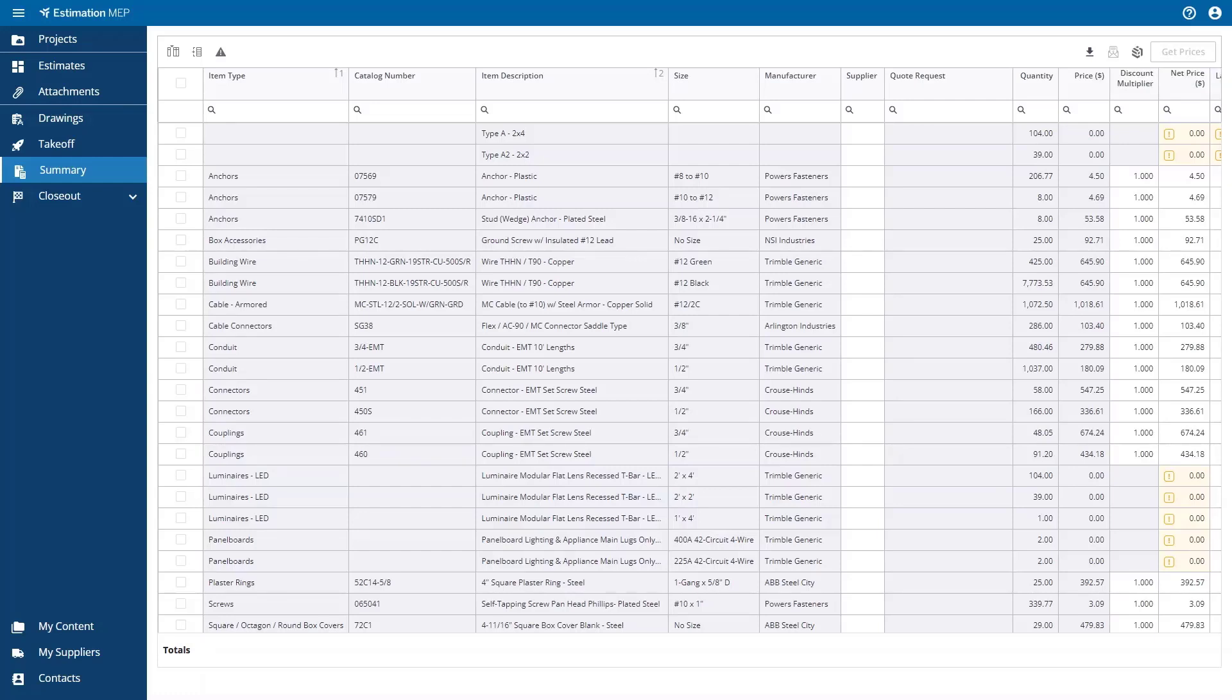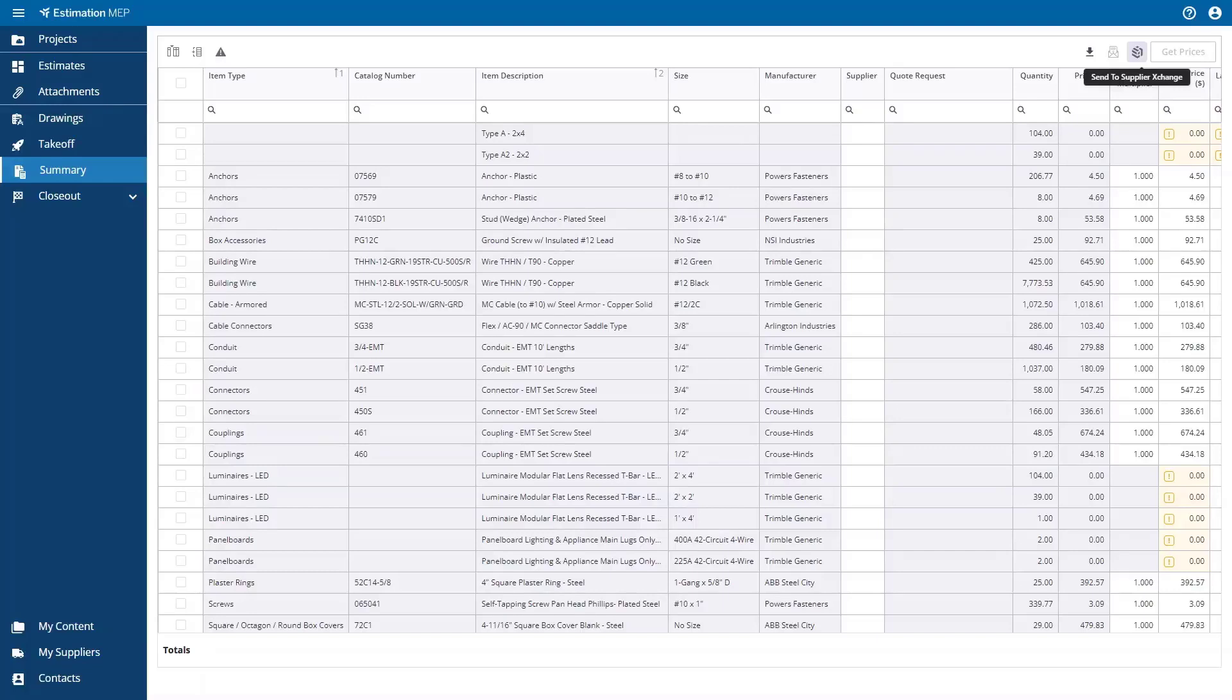After a job has been won, you can send the bill of materials to Supplier Exchange to start the procurement process, and this is initiated by selecting the Supplier Exchange icon. Setting up connections to your suppliers can be found under the My Suppliers option in the left-hand side navigation in the lower left-hand corner.